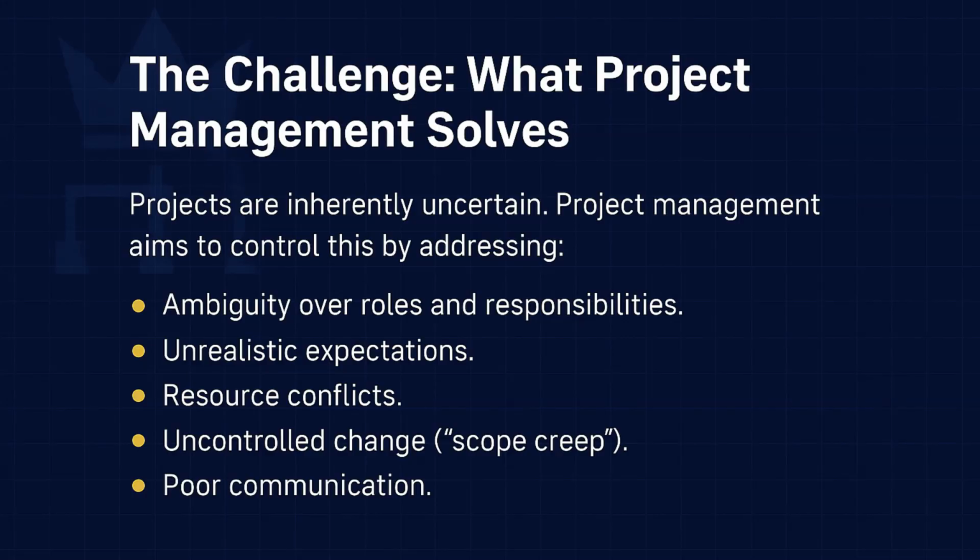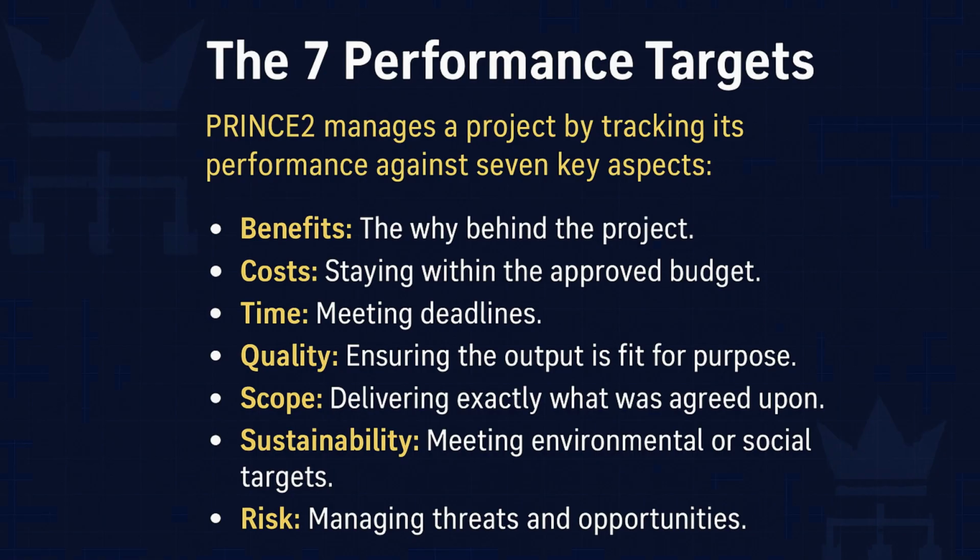It's their oversight role. Okay, so SU, IP, and DP get us to the point where the project is approved and planned. Now we actually start building stuff, right? Yeah. Exactly. Now we enter the cycle of delivery stages. The project manager spends most of their day-to-day time operating the Controlling a Stage process, or CS. CS. This is the project manager's main job during delivery. Pretty much. CS is about assigning the work to the teams in work packages, monitoring the progress of that work, managing the risks and issues that crop up within the stage, taking corrective action if needed within tolerance, and reporting progress regularly to the project board.